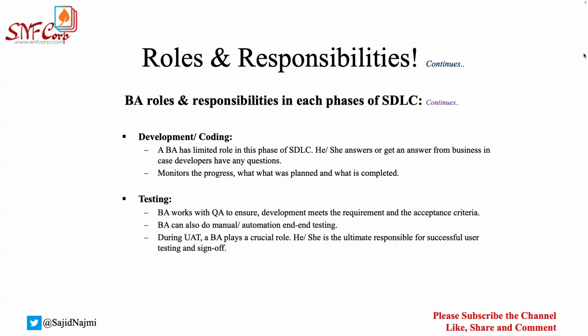Now, how come you can ask for the other brand? If you ask, that's fine. We can do it for you, but that will be a new requirement, and you will have to go through the requirement processes. That might cost them some money or time or whatever. So the sign off is very important for you in traditional waterfall, because there's no scope for changes unless you go through some change management processes. So it's a very hectic thing. So make sure you're reviewing everything in every phase and getting it approved. Now, during the UAT as well, you have to make sure they're providing you the sign off and approving the development.